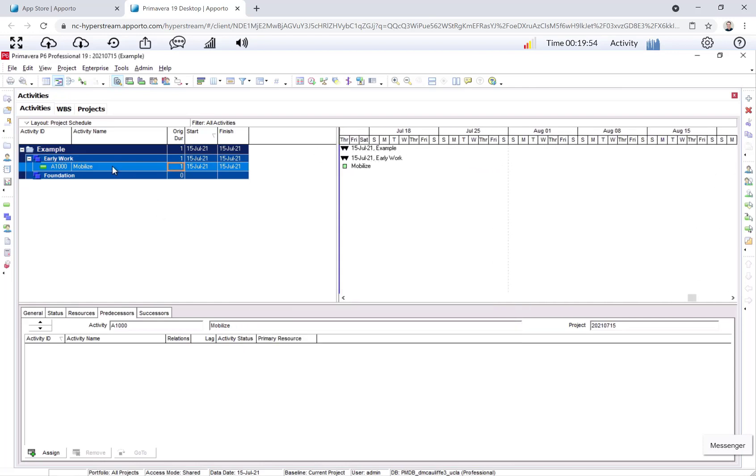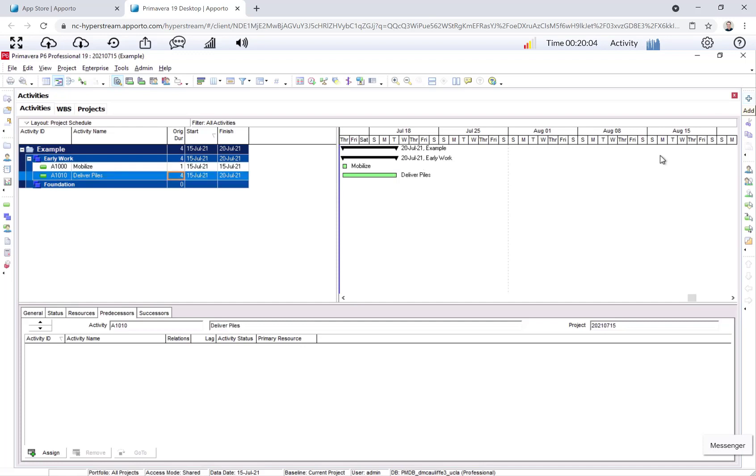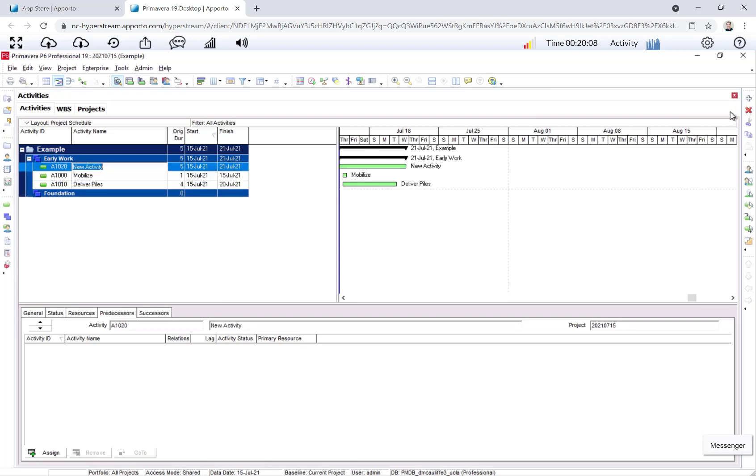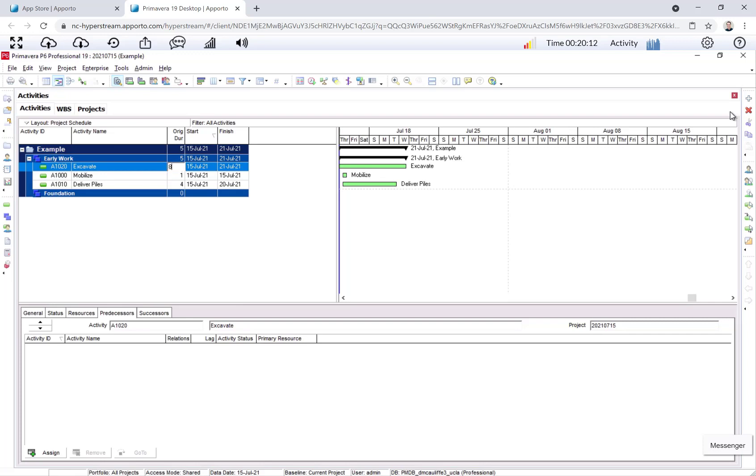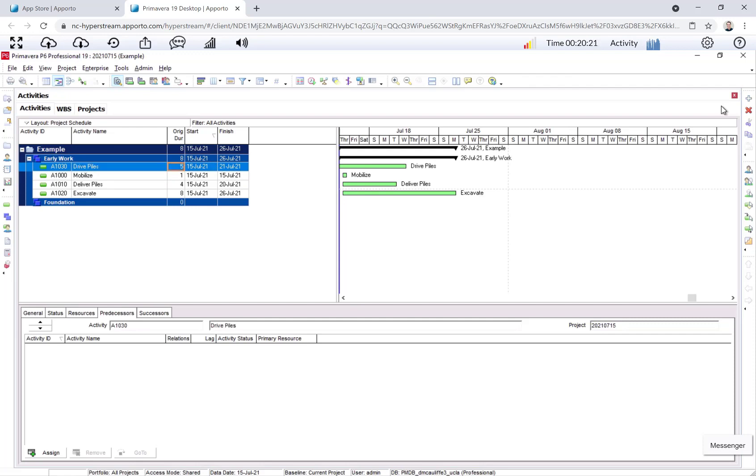Okay, I want to create the next activity, Deliver Piles. Deliver Piles takes four days. Excavate takes eight days. And one more, let's do Drive Piles. And Drive Piles takes three days.